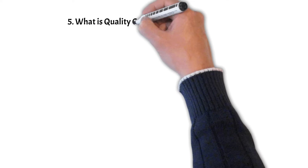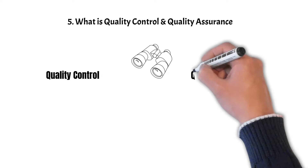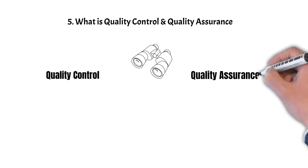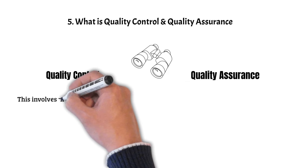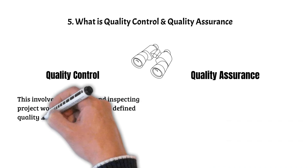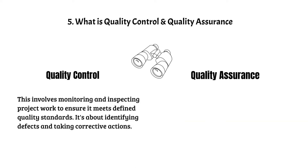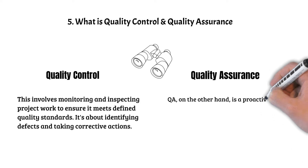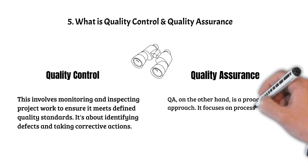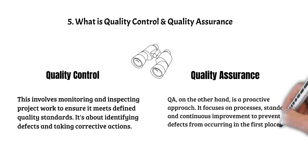Fifth, what is quality control and quality assurance? Speaking about project quality, it is important to understand and include both within the project. Quality control involves monitoring and inspecting project work to ensure it meets defined quality standards — it's about identifying defects and taking corrective actions. Quality assurance, on the other hand, is a proactive approach that focuses on processes, standards, and continuous improvement to prevent defects from occurring in the first place.